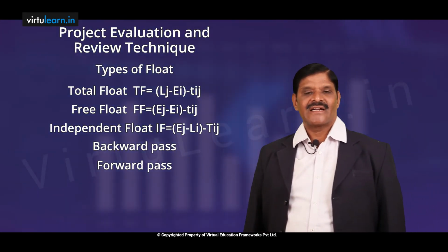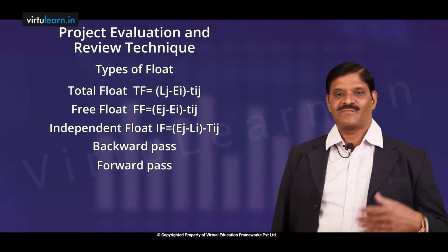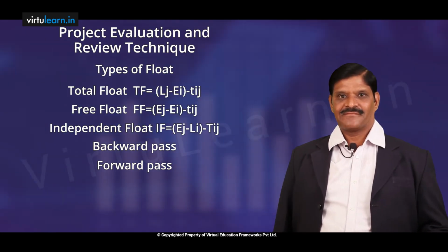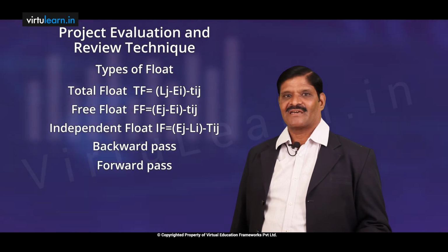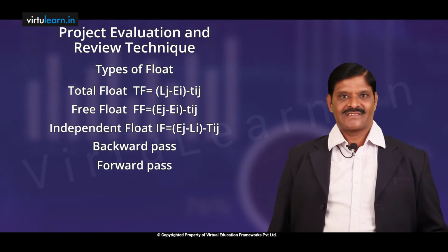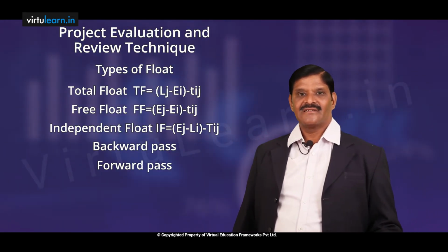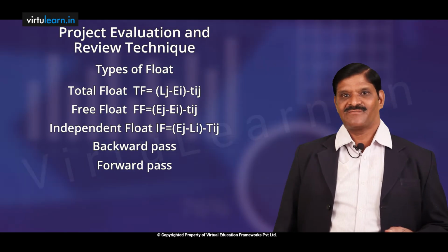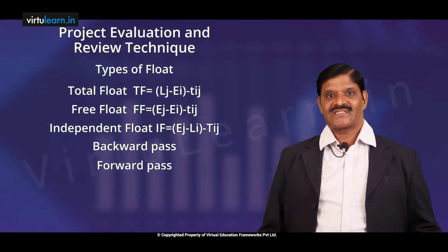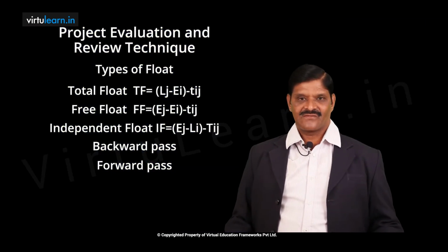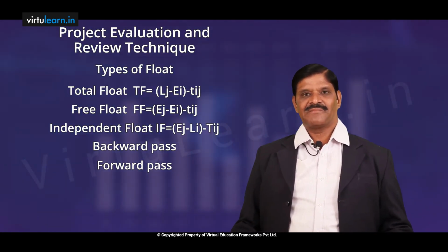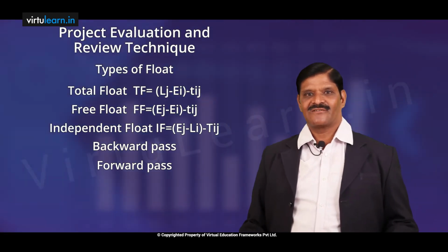different paths. And earlier we were discussing that there would be three time estimates for the PERT diagram. That means optimistic time is there, pessimistic time is there, most likely time is there. So when there are several activities that comprise a project, it really becomes difficult for us to estimate the duration of the project. Say there are 20 activities lying in a project, which time do we need to take, whether pessimistic time, optimistic time or most likely time. So that becomes very complex in estimating the duration of the project.